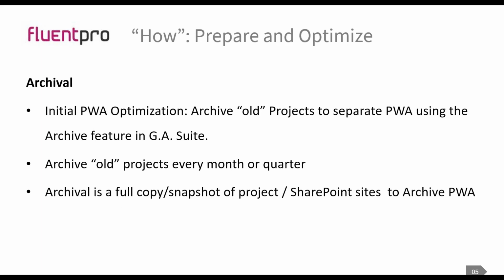Additionally, we offer larger organizations an archival scenario, if you have more than probably several hundred projects, like 500 or more projects in your PWA environment. To prevent crowding and to offload the current PWA instance, you may want to copy those projects along with their sites to a separate PWA that only admins have access to, and you can repeat that on a regular basis afterwards.